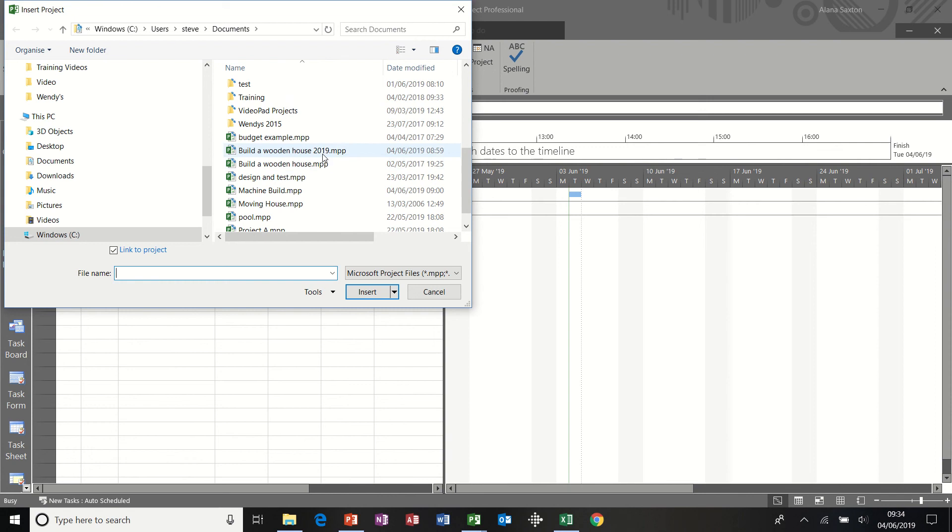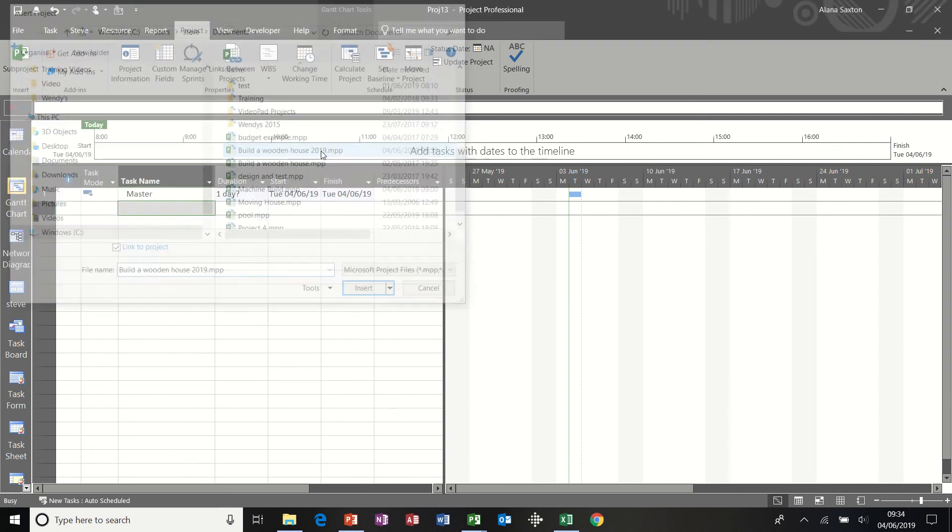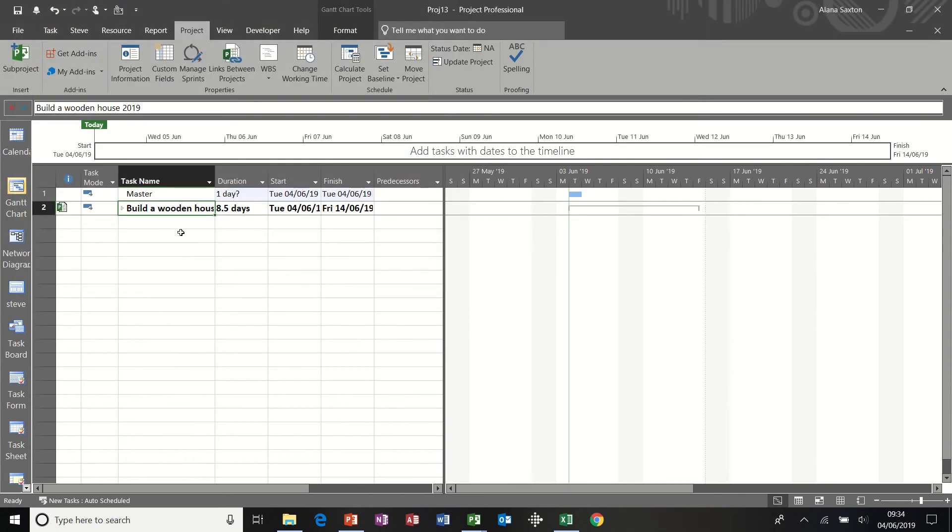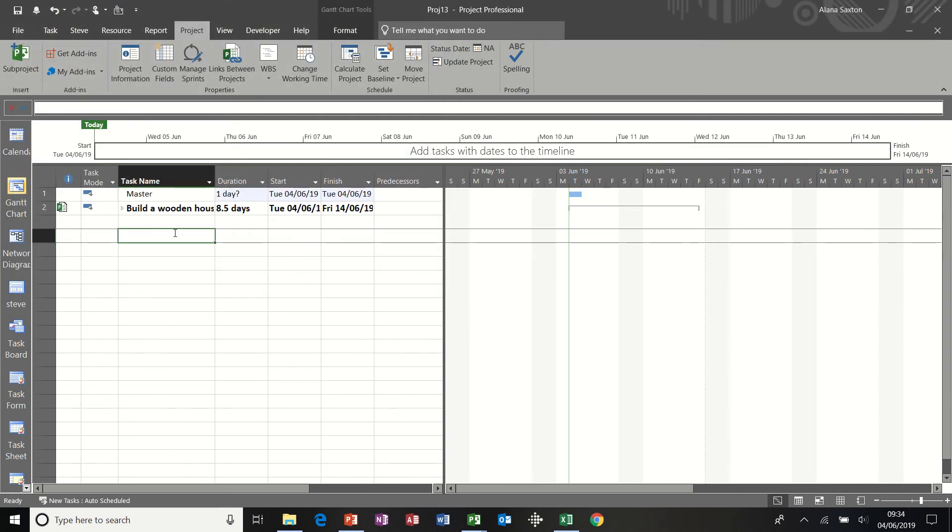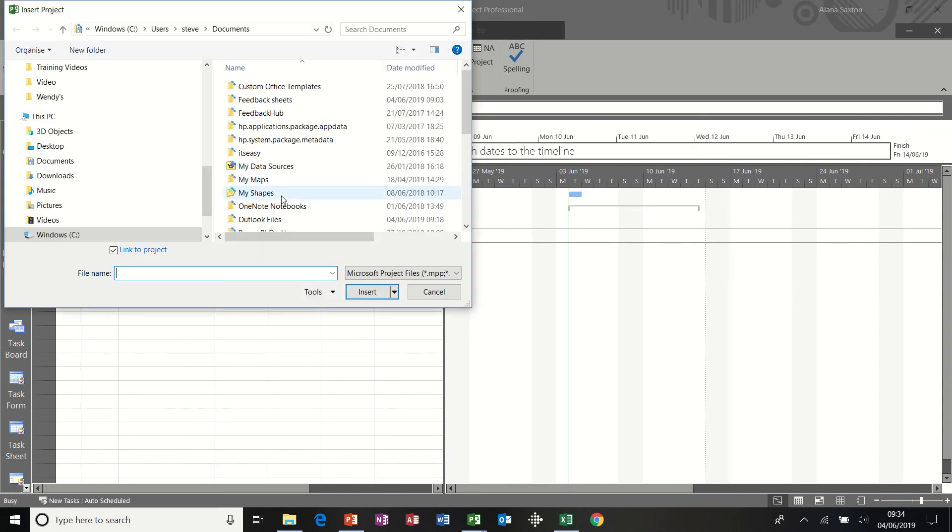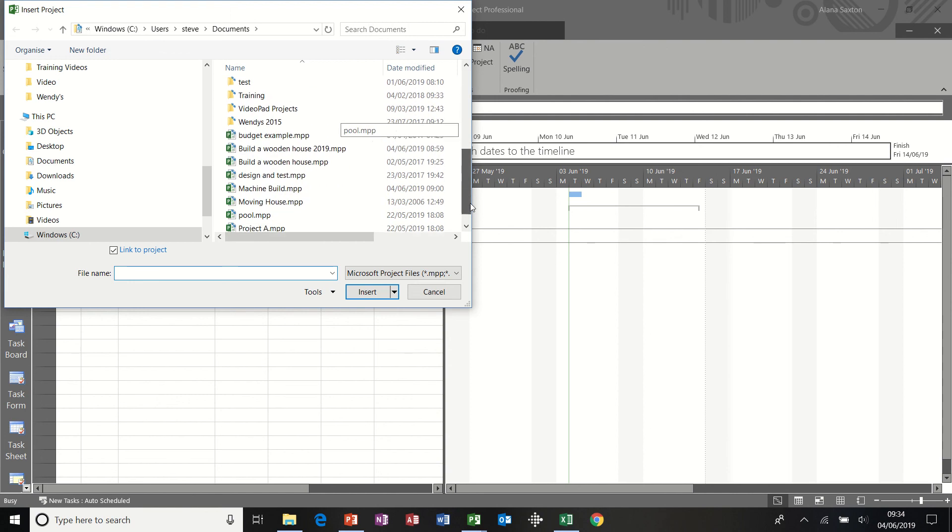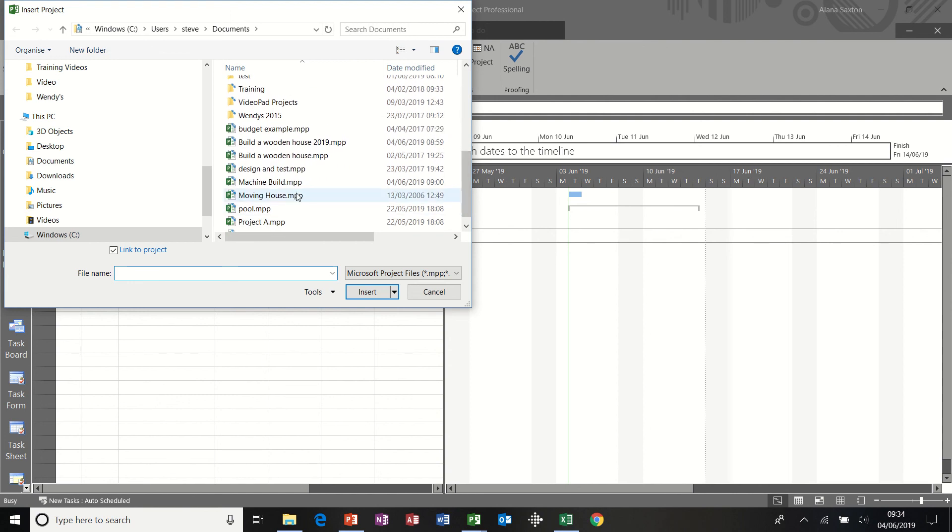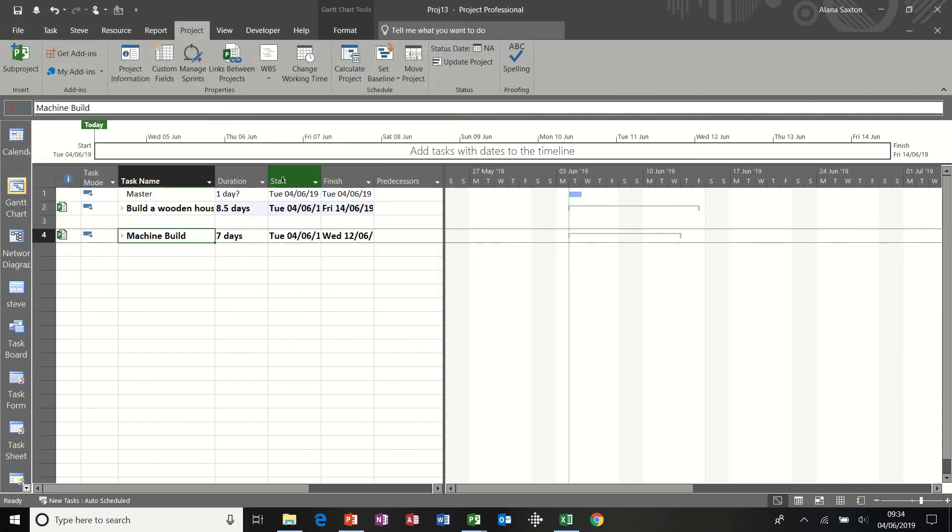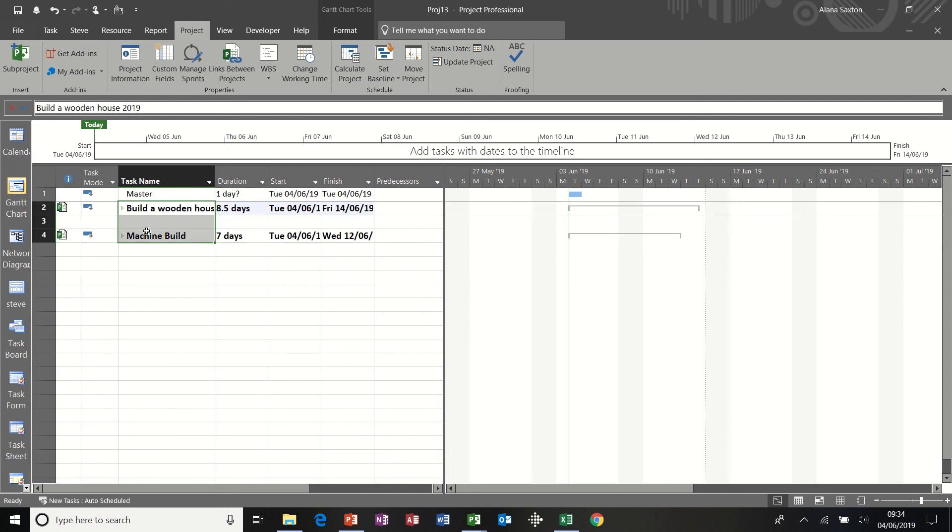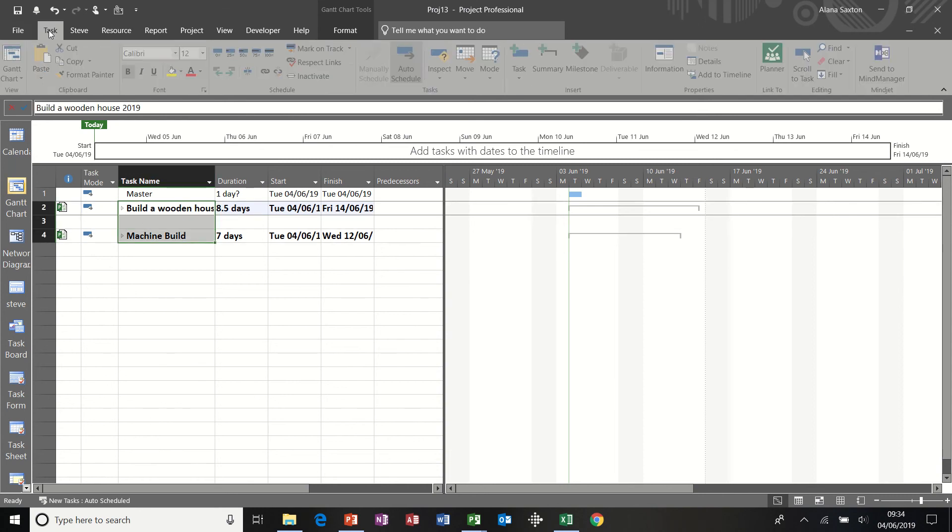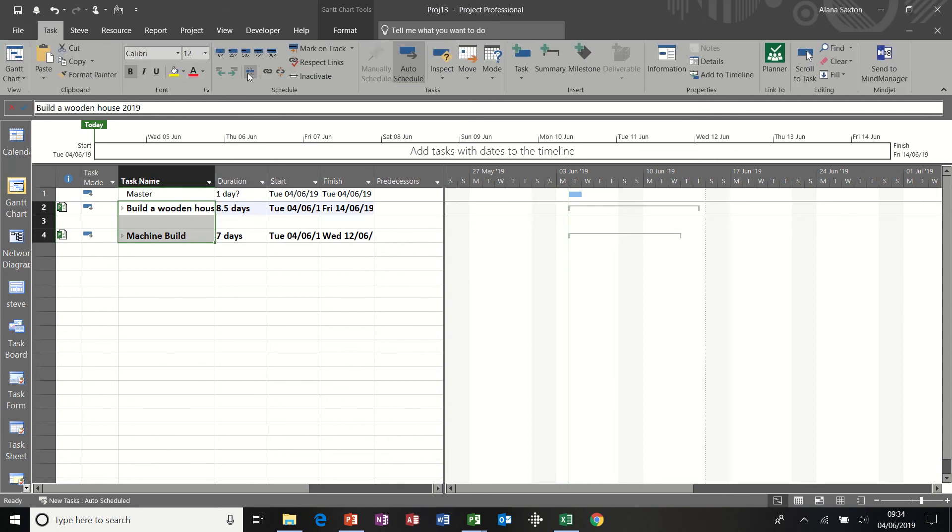And then I'm going to get a space. Bring another one in. Machine build. Now, if I indent these two, I should get a master duration.